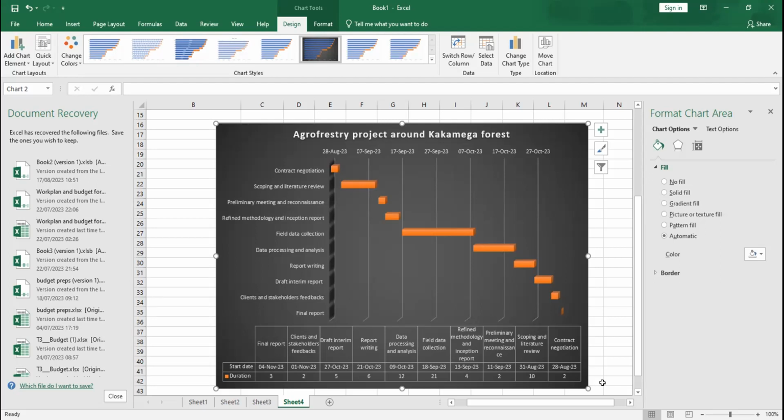We can still ensure that we conserve the 10 days duration that we had planned by simply adding more resources. That is the work of the project manager, to be on the same level as how things are happening in my project. And if you behave like that, these are very powerful tools for tracking our progress, which is very important during project implementation.